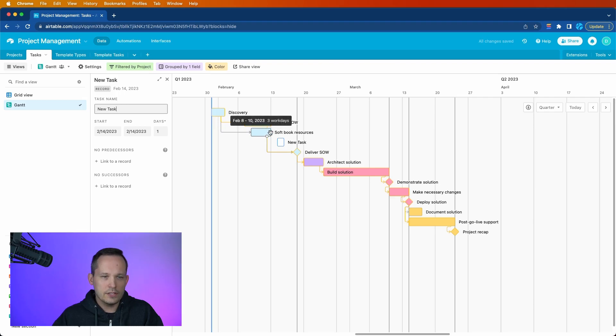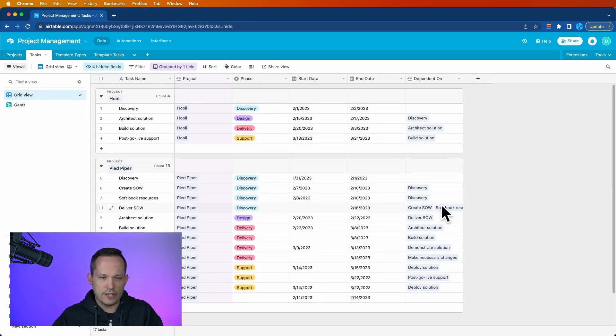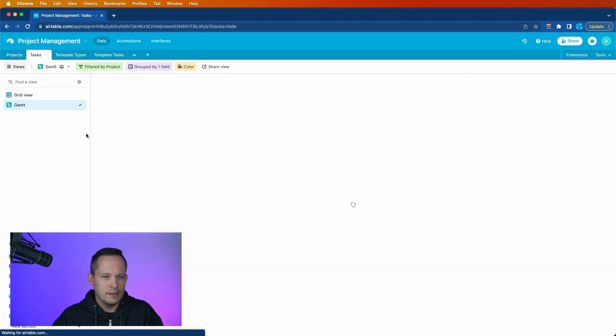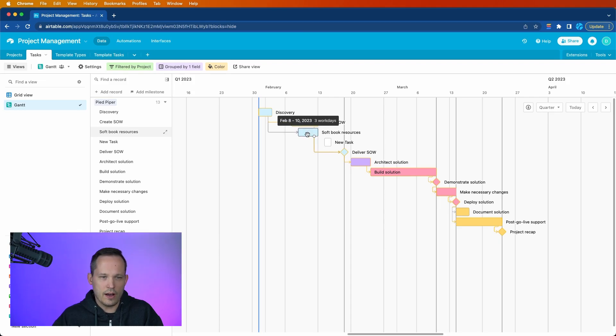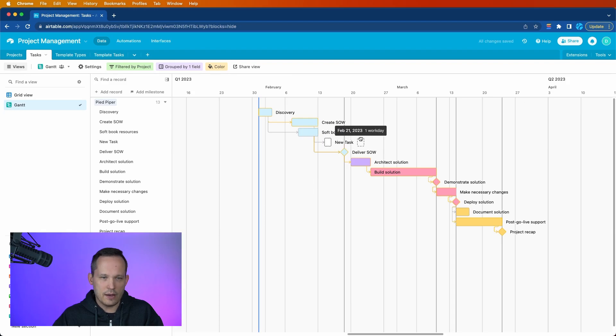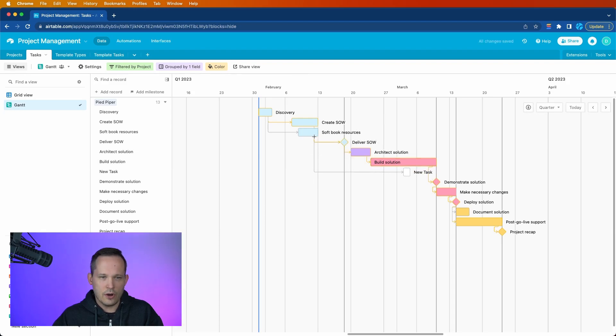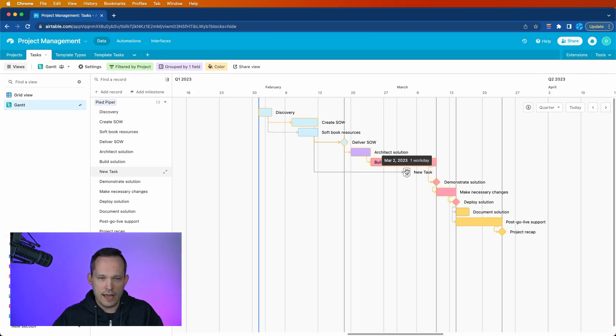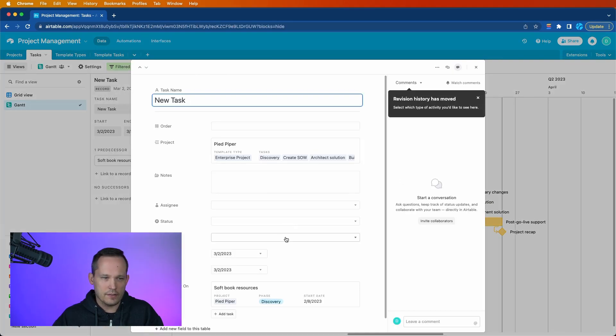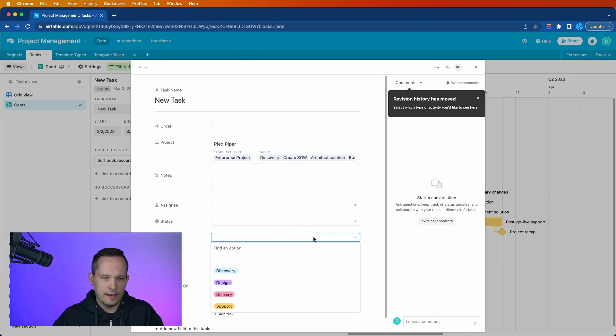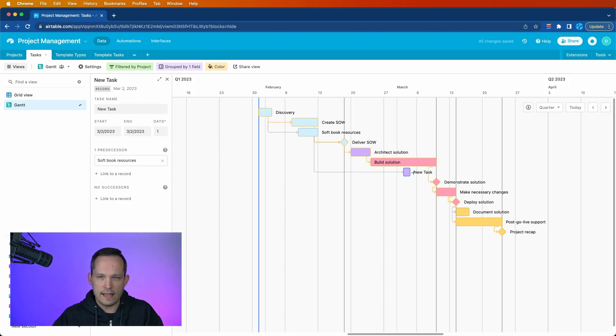And then also, if you want to be able to have dependencies, you can put the dependencies in the grid view, that's what I had done initially just to have some of that architecture there. But what's great is you can do it directly from here in a pretty nice fashion. So you can click, you'll notice that when you hover over a task, it's got the little bubble that appears here, you can go ahead and click, and then drag to that task. And that sets up now that dependency. So that's always starting from whatever the parent task is and going to the child to be able to manage that. And then of course, you can double click and open up that record if you want to add other things like add to our phase, let's say it's part of the design phase, and then it'll adhere to the color coding and things like that.